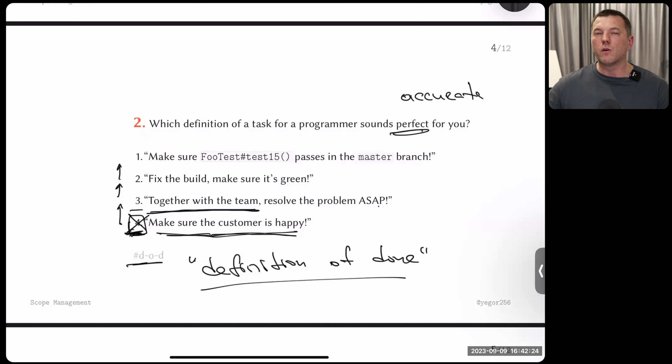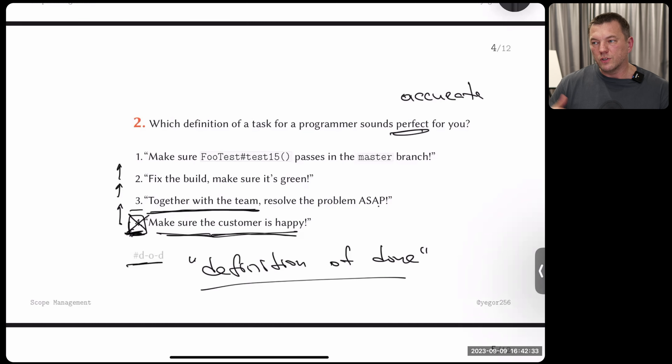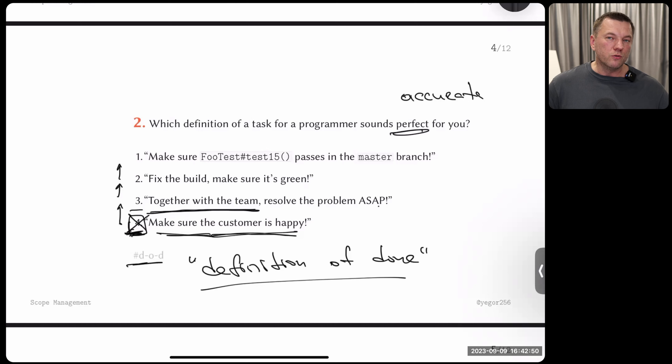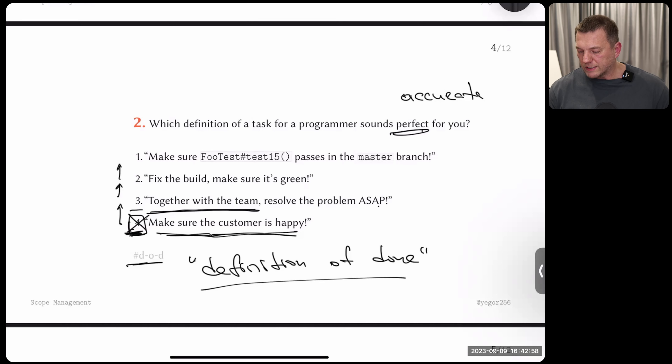Every task should be individually assigned to a programmer — not to a group. Group responsibility is a toxic instrument of manipulation: when everybody is responsible, nobody is responsible. If you assign a task to a group and say 'do it together,' you're basically admitting you're incompetent or lazy as a project manager because you couldn't decompose it into individual tasks. Never say 'we all failed this task together' — that encourages laziness and people looking for excuses rather than results.